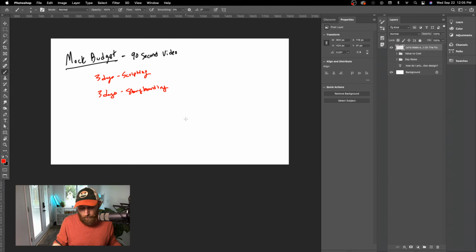From here, maybe we're going to need something like 10 days to design all the assets we need for the 90-second video. And then maybe I need something like 15 full working days to do the animation production. I have chicken scratch handwriting, I apologize. And then, let's say I need to build in 2 days of sound design.